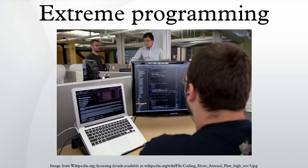Controversial aspects, the practices in XP have been heavily debated. Proponents of extreme programming claim that by having the on-site customer request changes informally, the process becomes flexible, and saves the cost of formal overhead. Critics of XP claim this can lead to costly rework and project scope creep beyond what was previously agreed or funded. Change control boards are a sign that there are potential conflicts in project objectives and constraints between multiple users.